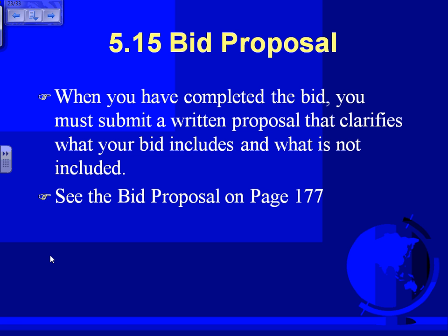So William, my friend, the slab inspection. The minute that we put the concrete slab and put our conduit and bonding, I want you guys to give me 20% out of the bid. Then rough end. When we do rough end for the building, I would like you to give me 55. And when we do final inspection and we give you the key for this room, I want the leftover, which is 25. You can divide them in so many ways, guys, floor per floor and so forth, but at least you need to have a plan of payment.